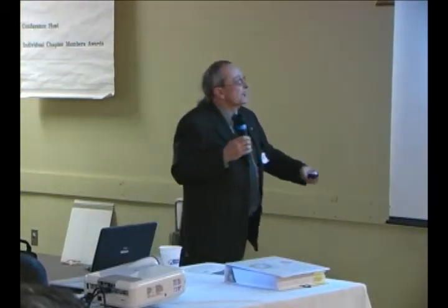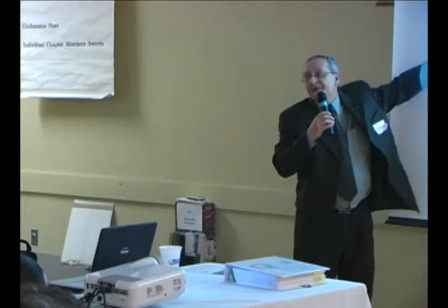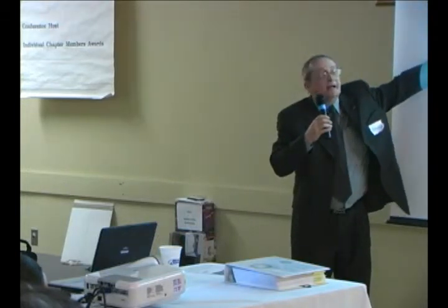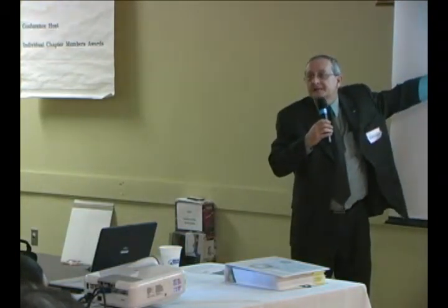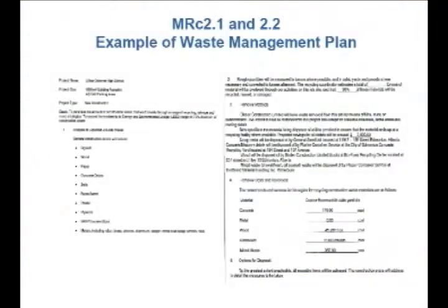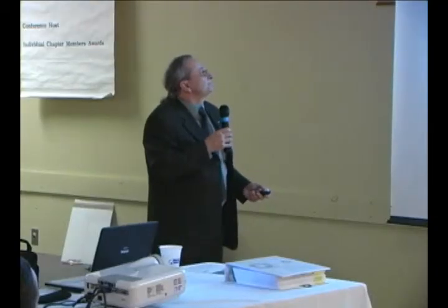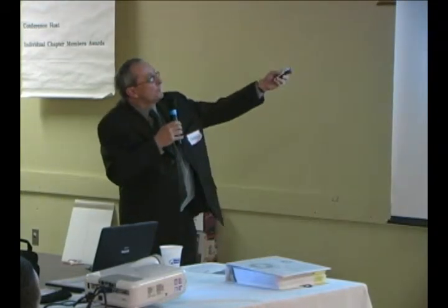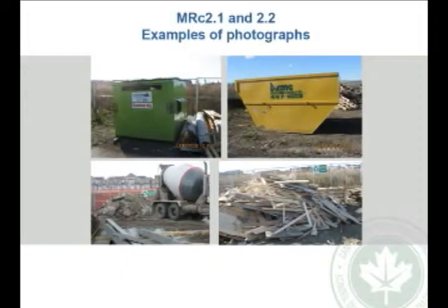And you can't do this after the fact. You have to have these at the time that that's being done. An example of the waste management plan that has to be submitted from the contractor, identifying what percentages of the materials are going to be reused, recycled. Again, the photographs clearly showing on the site that's being collected and sent out.